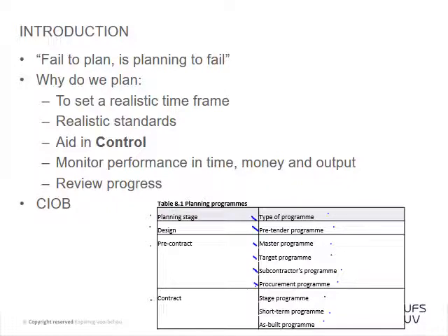Your contractor during the tender phase might look at some of these tenders, but when he's appointed and the contract is not yet signed, some of these programs will be enhanced. Then you have your contract programs, which are your stage programs, your short-term programs, and then your as-built program, which is at the end of the project, or as things change, your program is constantly being updated. I just wanted to give you a brief overview of what programs there are.